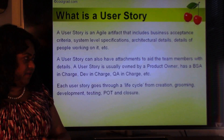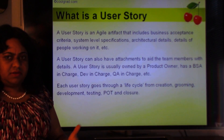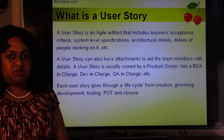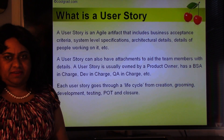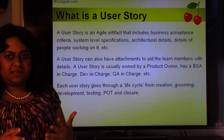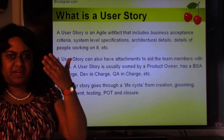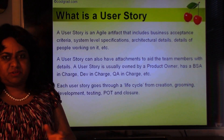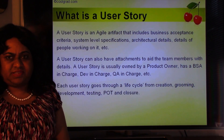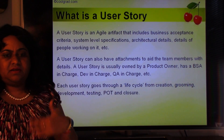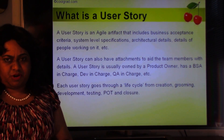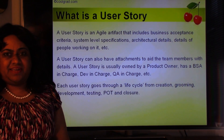Each user story goes through a lifecycle: creation, grooming, development, testing, product owner testing, and then closure. First the product owner creates it. In the grooming phase, we populate all the details and make it ready for development to be picked up in a sprint. Once in the sprint, the developer codes what's in the story, then it goes through testing, then product owner testing or UAT, and then it's closed out at the end of the sprint.